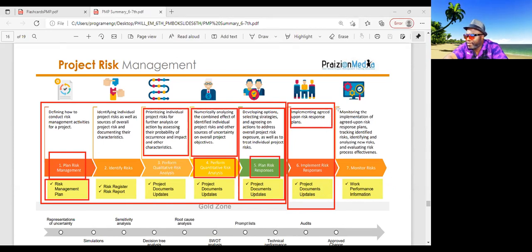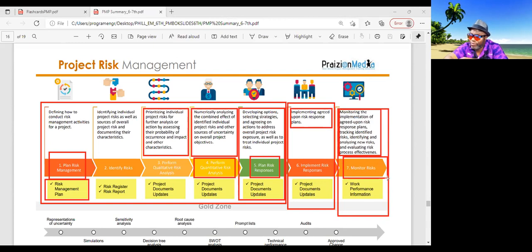All right. And what else? And then the monitoring of the risks, monitoring the risk on the watch list, making sure that they haven't changed. If they have changed, making sure that you update the register and taking into account whatever else anyone has discovered. So if you get a question about new risks, where are they discovered, you look for new risks in the monitor risks process.